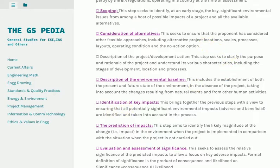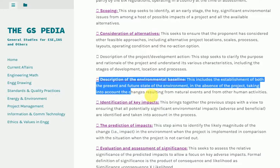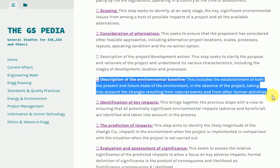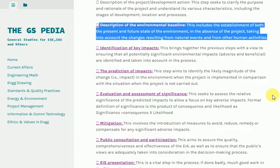Description of the Environmental Baseline: This includes the establishment of both the present and future state of the environment in the absence of the project, taking into account the changes resulting from natural events and from other human activities.